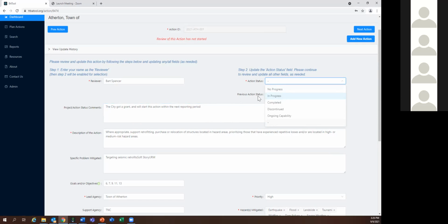In progress would mean that there is a timeline for a specific project. Let's say it's a 3-year project. That's in process because it does have an end date, a specific termination date. Completed makes sense, you've completed the project. You do need to update that every year and just say, yes, the project has been completed or is completed in 2017 or 2023, and things like that.